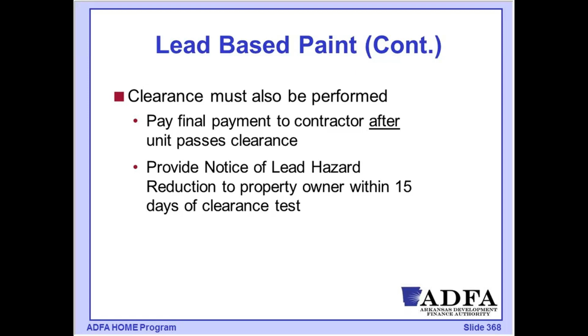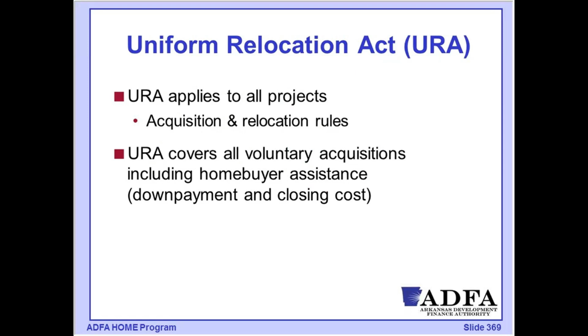And as part of that, we're going to provide a notice to that property owner within 15 days of that clearance test. So we provide them good information about all of the results, and it gives them also records for what's been done for that house and how it was found to be acceptable.